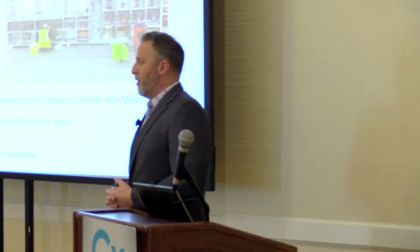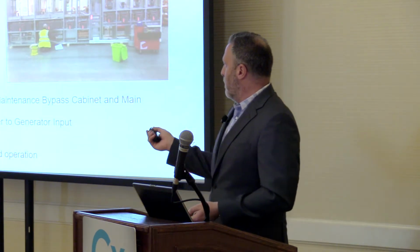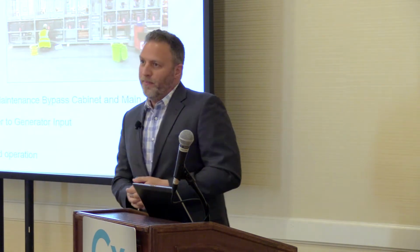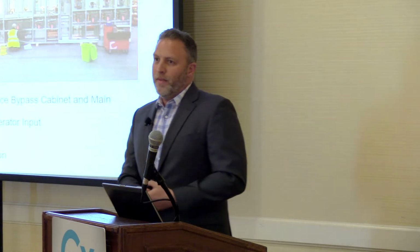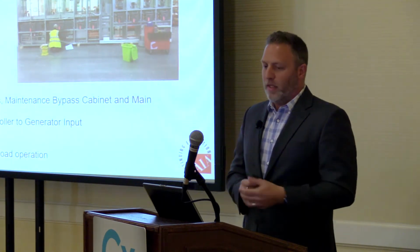As all the components are, again, brought together, there's going to be an integration aspect as well, where they're going to start bringing in the clean agent, the fire alarm, and all the BMS points. So all of this marshalling section here has where all of the BMS points go out of that switchgear and into a BMS panel. Do all of your point-to-point checks at that panel. Make sure that all the internal wiring is good here, and then all the wiring back to the panel is also good. You're going to be saving yourself a boatload of time during your level 4 testing to prove out that module now in level 2, as well as saving the client time when they're just trying to get this facility turned over.